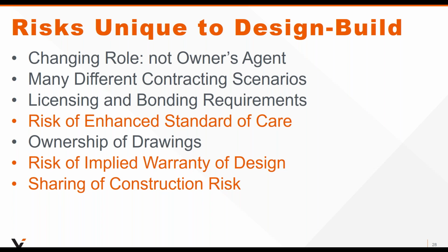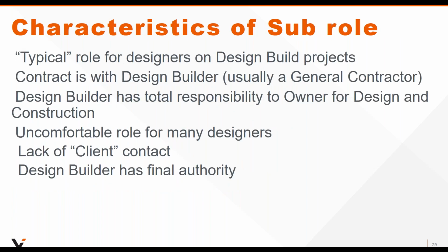So one way to protect yourself is to make sure that the ownership of drawings is such that the contractor has a very limited license to use it to prepare the bid and nothing more. That's one way to protect your interests. And then there's the risk of implied warranty of design. And obviously you're sharing construction risk, which is new for most design firms.